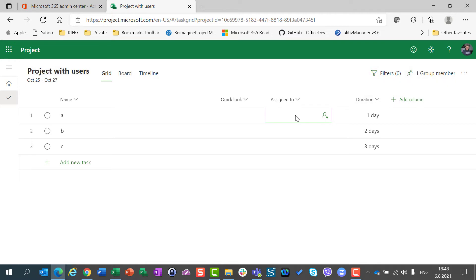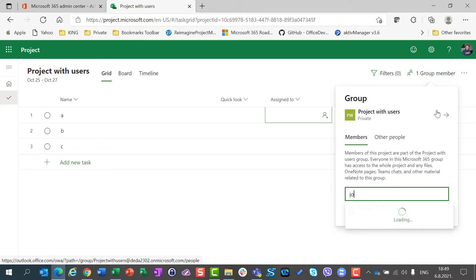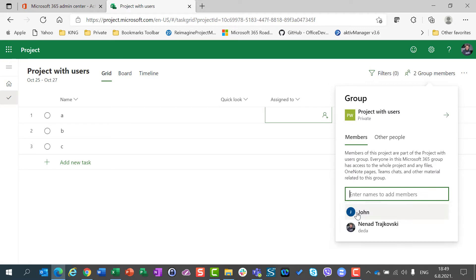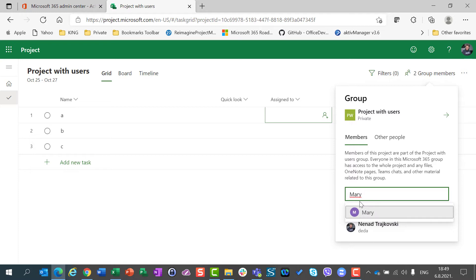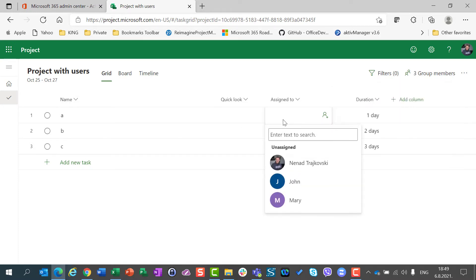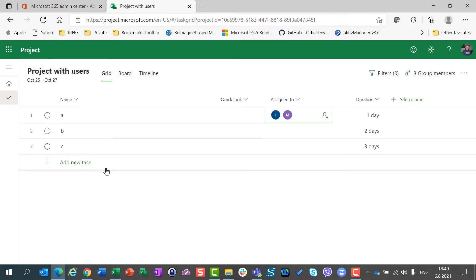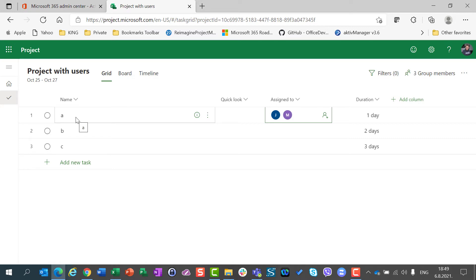Now, I can add a resource in two ways. I can add members from here. Which members are going to be part of my group? I can say John. And I can say Mary. And Mary is also part. So, when I assign John here and Mary, if they log in with their account to Microsoft Project for the Web, they will be able to see their tasks.